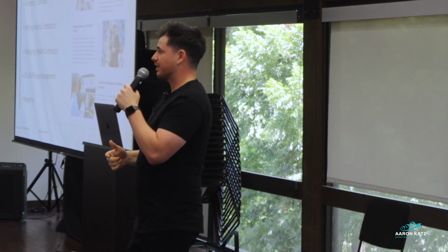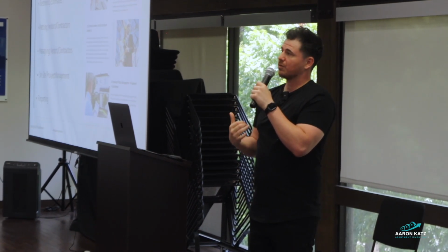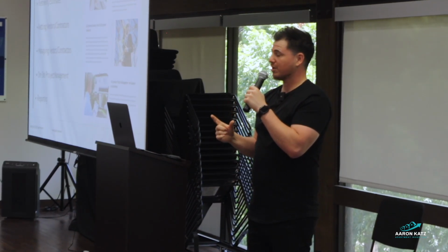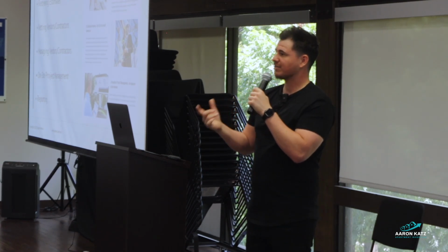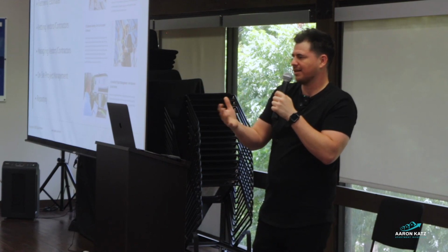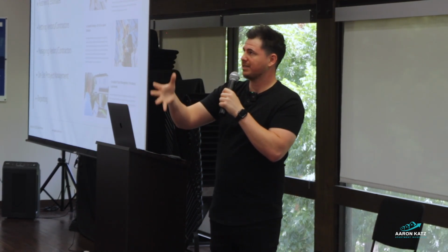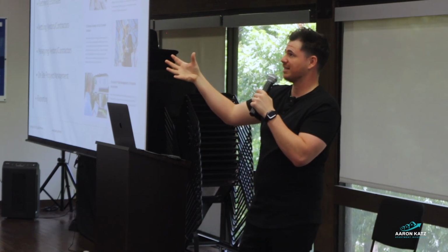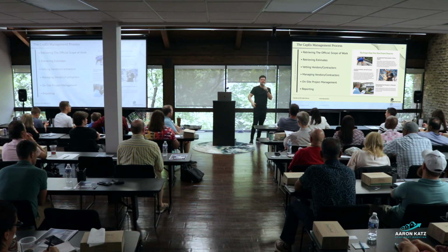Then we have to vet the vendors. We have to get to know them, get their referrals, get their references, and really important, if it's a big project, we've got to get their cash position. They'll say, yeah, I've got the money, I can handle this project. But which LLC am I going to be paying, and can I see your cash position in that company? I need to know you have enough money that if something goes wrong, you can cover it. Because if they go out of business, they run out of money, you don't get that money back.